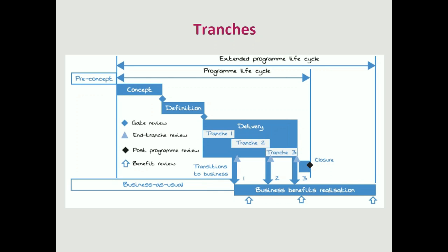Firstly, look at that black diamond down in the bottom right. Programs do not go on forever. They tend to be rather longer than a project, but where you see a program that goes on forever, you should be questioning whether this really is proper program management. Program management is about delivery of the change, and it should then come to closure and transition, making sure that everything is transferred to business as usual.